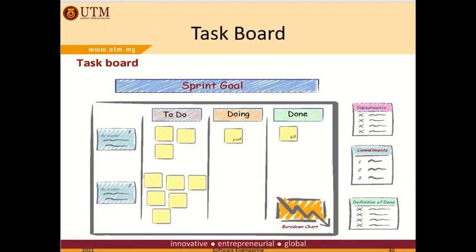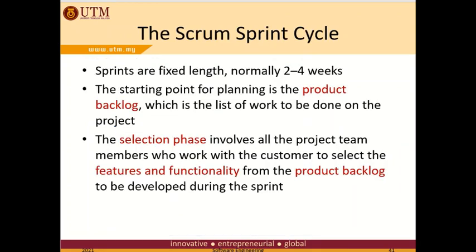The daily interactions among Scrum teams may be coordinated using a Scrum board. This is an office whiteboard that includes information and post-it notes about the sprint backlog, work done, unavailability of staff, and so on. This is a shared resource for the whole team, and anyone can change or move items on the board. It means that any team member can at a glance see what others are doing and what work remains to be done.